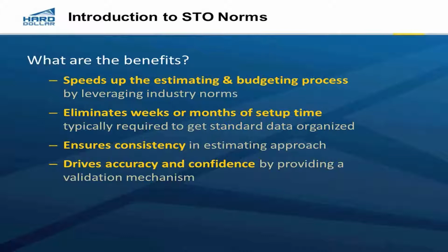That also drives the next benefit, which is ensuring consistency. If we're doing a particular task on a plant, we're using the same baseline assumptions. If that plant is in a certain part of the world, we're going to use the same man hours per unit assumption on project 1 as on project 2, as long as those projects are in the same geographic area. It doesn't mean we can't change them on a job-by-job basis, but at least we've got a reference point to start from.